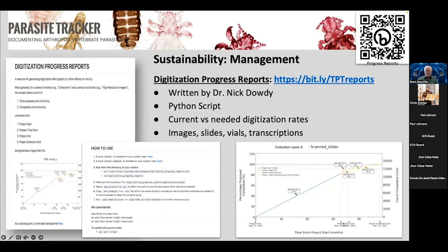As part of the TPT management process, we've created digitization progress reporting graphs. These progress graphs show not just the project start and end date, but the rate at which a collection is currently digitizing and the rate at which they need to be digitizing to meet their goals. These graphs can be made for overall digitization of a collection or group, or